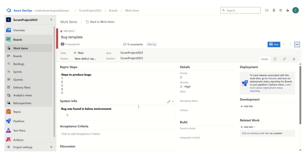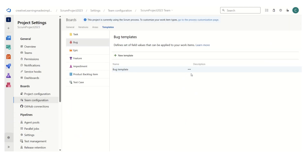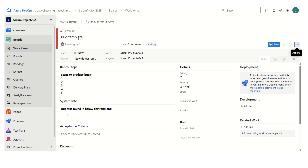It gives the team member an indication — this is the section where they have to write what are the steps to reproduce the bug, this is where they mention the environment or system information. The basic severity I have mentioned as 2 — high. If you want to change it, we can, but we have to edit the template from the settings only. Don't be confused — this particular template is giving us an option to define a new bug, but we cannot modify a template from here. In order to modify any template, be it for bug or product backlog item, we have to edit from the project settings.